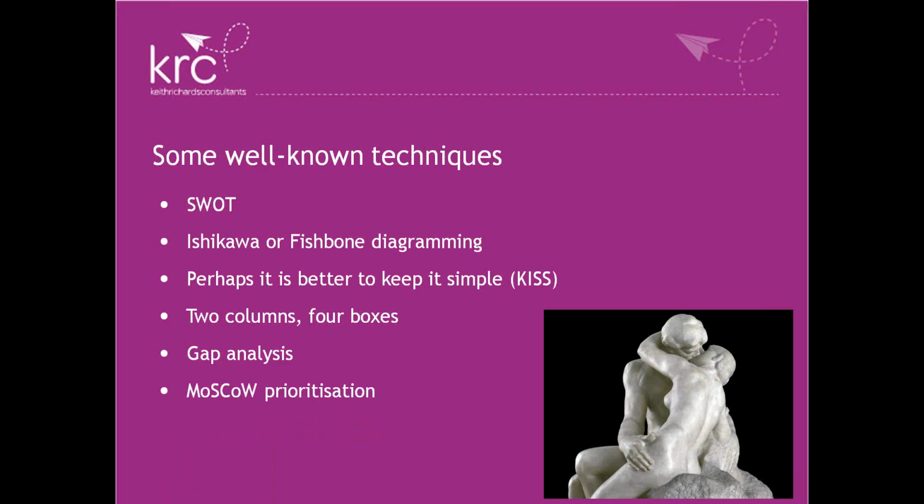And another simple prioritization approach is MoSCoW, where again you could have 3 pieces of paper. What must we have? What should we have? What could we have? And it's simple. It's very easy to use. But as I say, the mantra is quite simply keep it simple and don't let the technique get in the way. I've seen people in a workshop with a post-it going around going, is this legal or environmental? And the point is, the post-it's valid. It doesn't really matter whether it's legal or environmental. Get it up on the board, because that's going to help us to get to our goal.